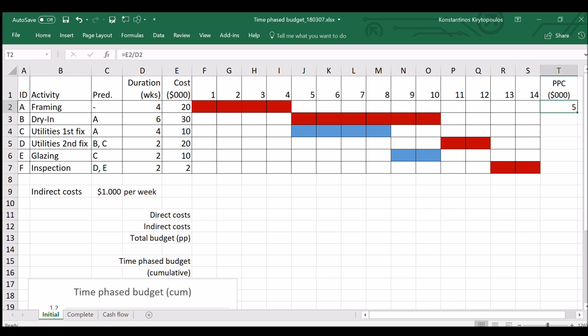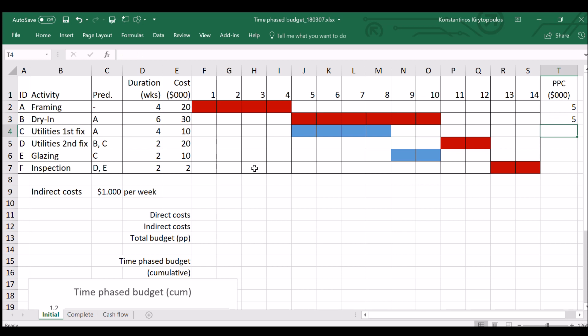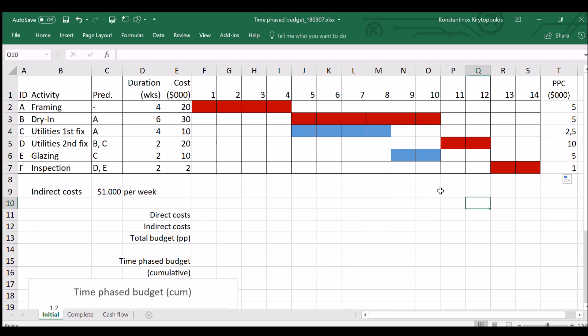If we do the same for B, that would be $30,000 over six weeks duration, which is again $5,000 per week. And we do this for all the activities and we get the relevant results.